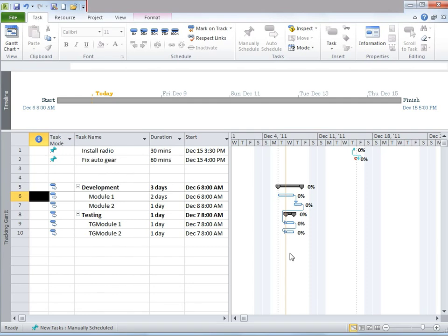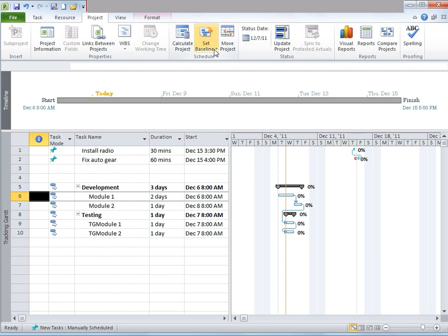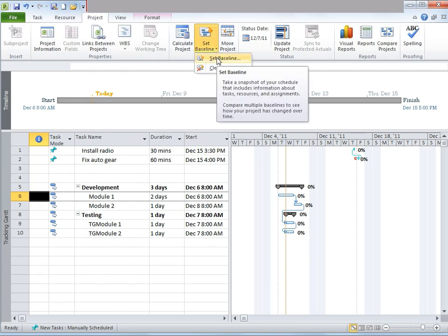As a user, we will need at least one baseline to be able to see plan versus actual progress. Baseline is a common project practice which refers to a set of data about the project that represents the state of the project before work initiation. Baseline proves valuable in comparing real life of the project with that of the project during the planning stages. The project supports about 11 baselines in a single plan — 10 baselines and a standard initial project status.